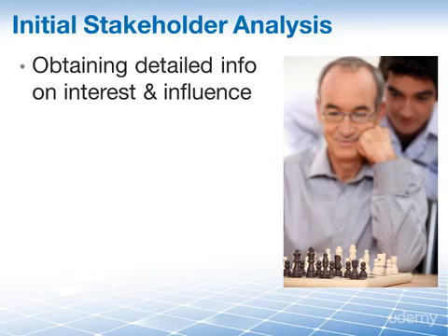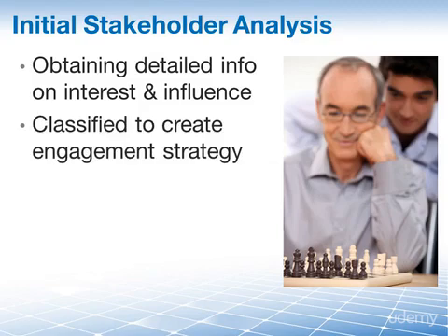After each stakeholder on the project has been interviewed and you, the project manager, have determined their potential impact or support on the project they could generate, then there will be the need to classify them in order to define an appropriate engagement strategy for each of them. When dealing with large numbers of project stakeholders, it's crucial to prioritize the stakeholders in terms of their influence and interest in the project. This will help to ensure that the engagement and communication effort that we expend on each stakeholder is proportional to the effect that they will have on the success of the project.